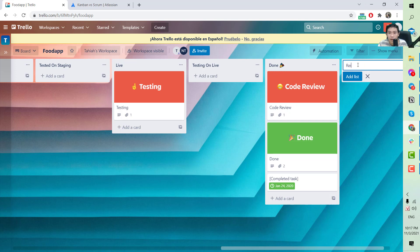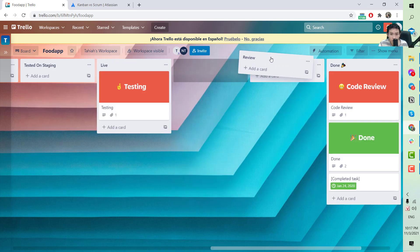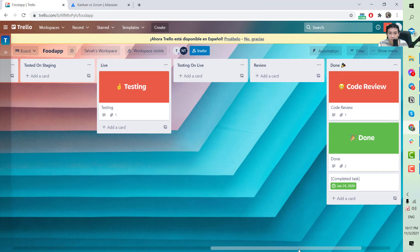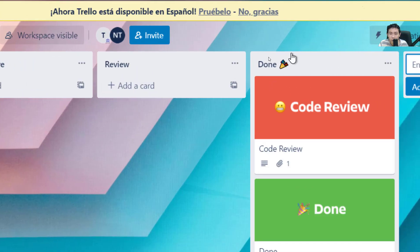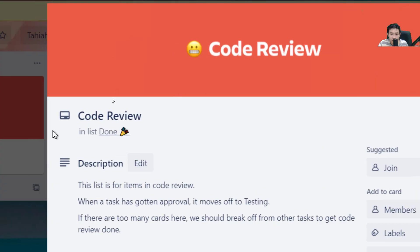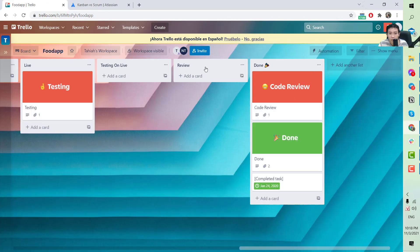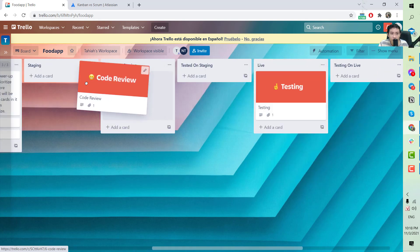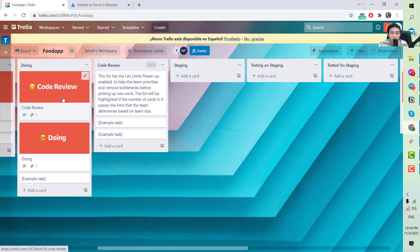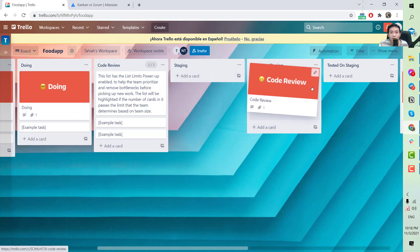There should also be a Review column placed before Done. When a card is in Done and the customer reviews it and finds bugs that the QC and QA engineer missed, they move it back to Review to let everyone know there are still bugs that need to be fixed. From there, the developer moves it back to Doing and restarts the process.